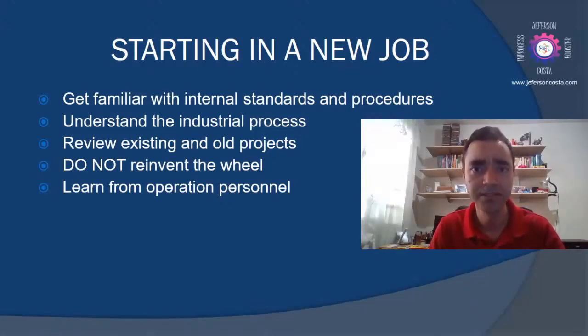And what happened was that during the commissioning startup of the plant, we started the production, we started filling liquid into this storage vessel, and when we tried to open the isolation valve, it was stuck because there was too much weight above the valve.